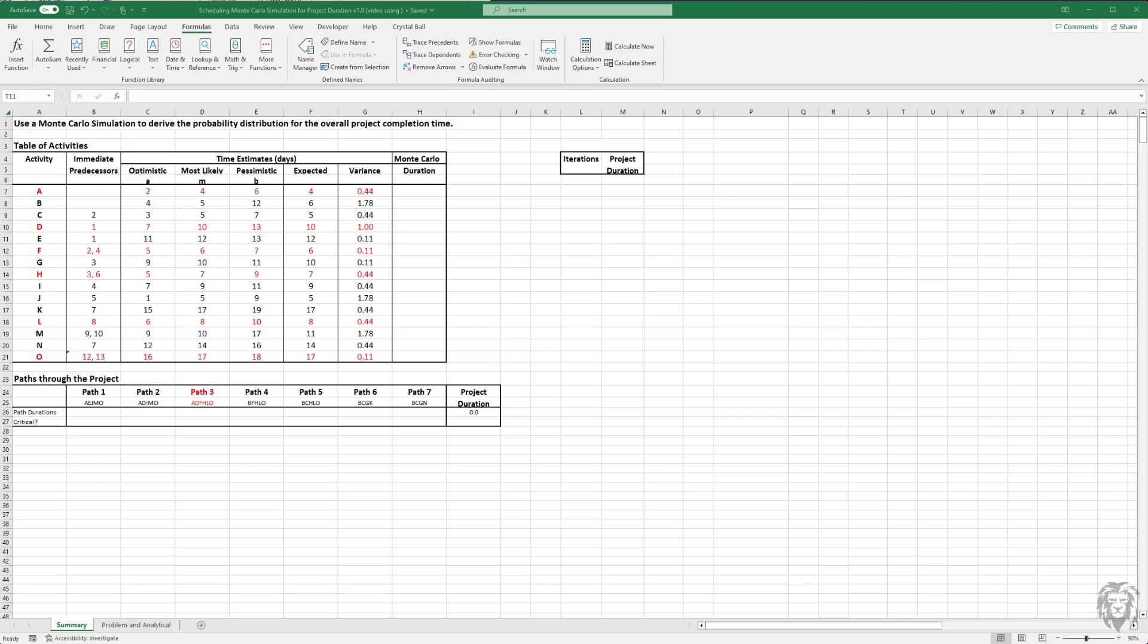We're going to use a Monte Carlo simulation to assess the uncertainty surrounding the project duration. What's really interesting is figuring out how convergence bias through the various possible paths in a project might change our outcomes or change the probabilities of project duration. Of course, we can do an analytical evaluation of the critical path itself, but it might not remain the critical path in all instances of the project.